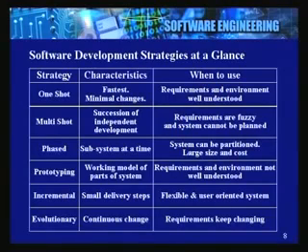Okay. The first one, for instance, is a one shot. This is an ideal kind of a strategy. It assumes that you have a well-known application and you need to start and finish it in one go. If you were to develop a payroll or inventory application, it might possibly fall in this particular kind of activity. Very rarely are large projects ever undertaken with this type of approach.